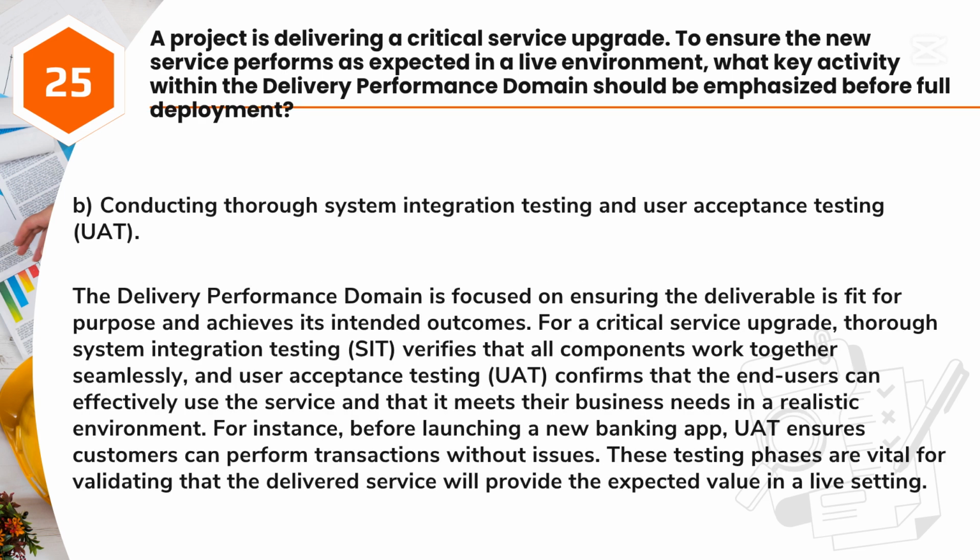Answer: B. Conducting thorough system integration testing and user acceptance testing, UAT. The delivery performance domain is focused on ensuring the deliverable is fit for purpose and achieves its intended outcomes. For a critical service upgrade, thorough system integration testing, SIT, verifies that all components work together seamlessly, and user acceptance testing, UAT, confirms that the end users can effectively use the service and that it meets their business needs in